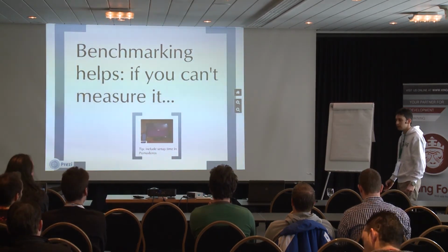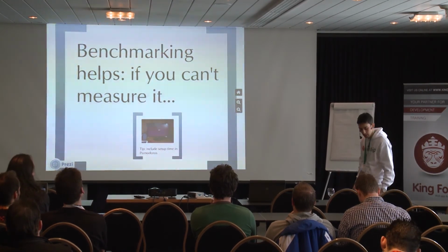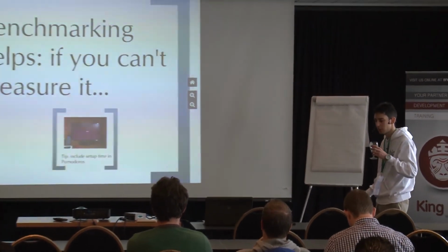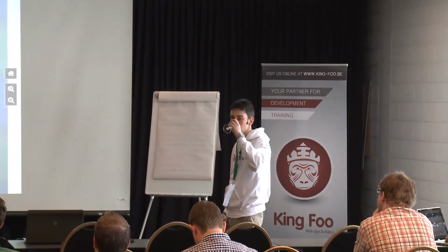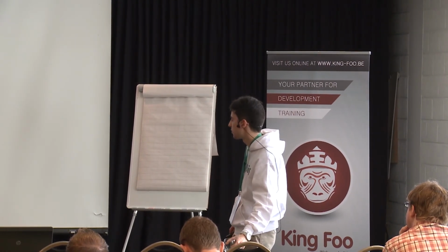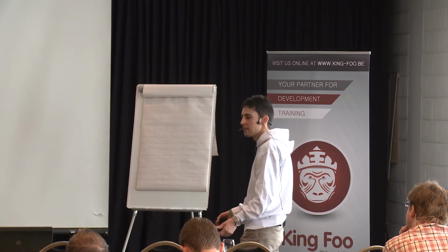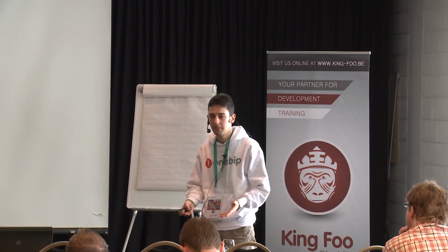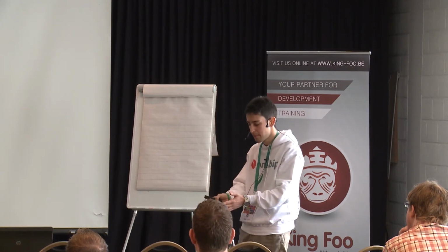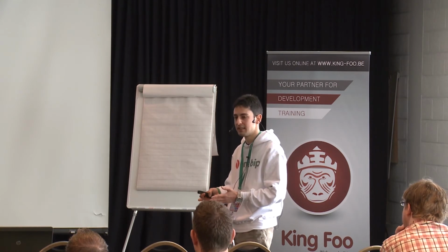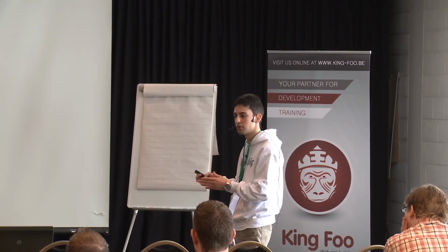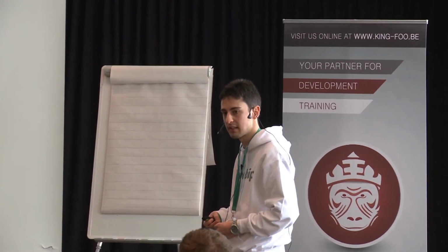The last way in which the Pomodoro helps you improve your efficiency is by giving you a simple benchmark, of course, like we see in estimation. The tricky thing is to include everything in your Pomodoros. So what happens usually with stories is that people estimate the amount of time it takes to code them, but not the amount of time that it takes to write tests or to put this feature in production or to monitor that it is working correctly.